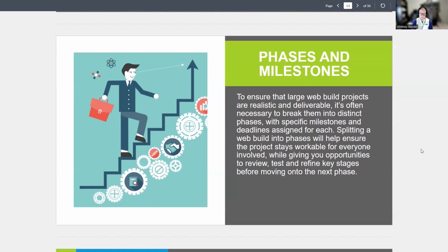But a lot of times people want to have something that is deliverable that goes alongside of that. And you would even want to put into your documentation information like, okay, well, what happens if something comes up and you're not able to actually meet that milestone? And what would be the agreement on if you would postpone getting payment? If they are wanting to pause a project, what would be your agreement for those milestones? Like, can they also cancel the project partway through? Just kind of having all of that really laid out and having a clear idea of what will be happening at what pace.